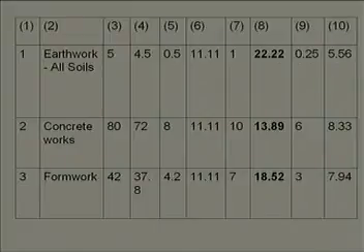Now just see column number 10, it is showing 5.56, which is lesser than 11.11. That means for the initial items, the items which I am supposed to take up at the beginning, I have used a lower margin.